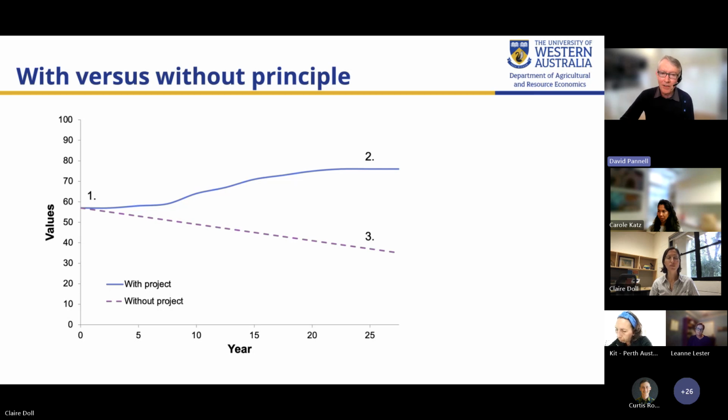And the key trick here is that this is different from a before versus after comparison in most cases, because the world isn't static. And we very often expect that in the absence of the project that we're thinking about doing, the world would not stay static.